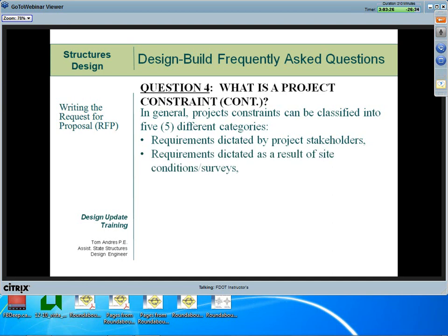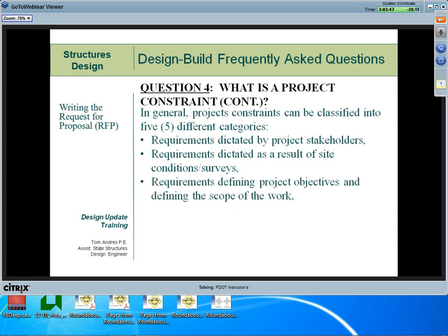These may include containment due to lead-based paint that may exist, turbidity and access requirements when you have seagrasses, and site and environmental classifications for setting concrete covers and mixes, etc. Other types of constraints are governing documents referenced in the RFP, including things like the structures manual, the PPM, and or the AASHTO design codes. This also may include whether the RFP attachments are attached for information or attachments regarding requirements, and how you attach the document is really important here.